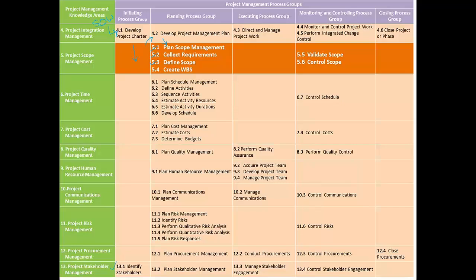Once we have a subjective document like the project scope statement, we would break the scope into smaller and more manageable work components called work packages. The process of breaking down the project scope into small work packages is called Create WBS.